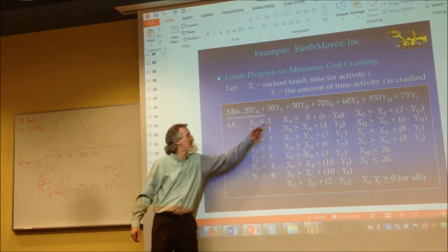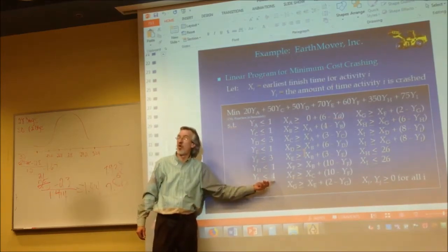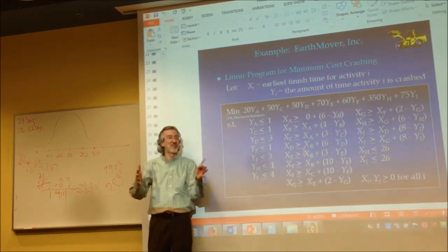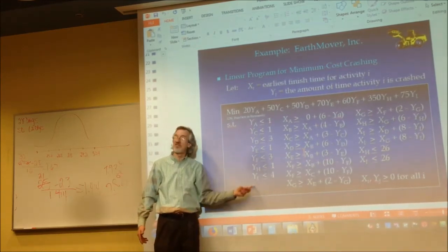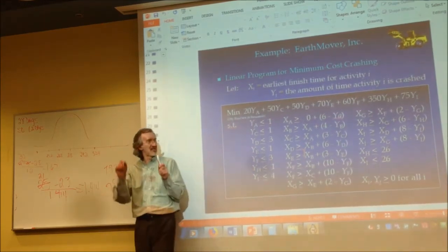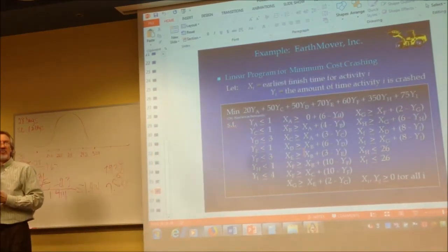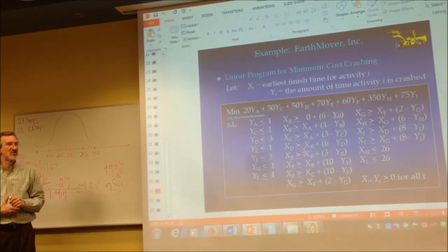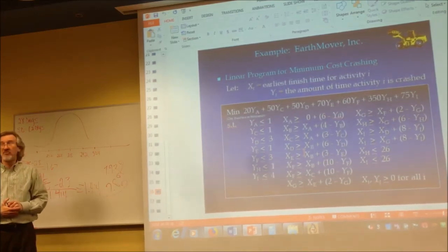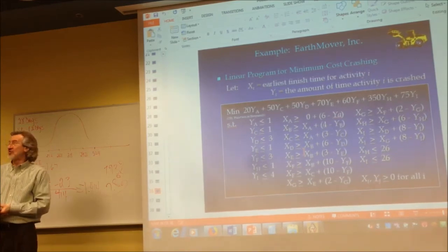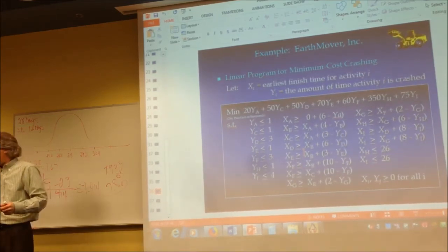So that's how these y constraints work. It's the number of units that could possibly be crashed for each activity using the y variables. Y represents units crashed. That's what that variable represents. Y is the units crashed. You got that. So objective function, y constraints, they're easy, right? You just got to do the math when you get this.